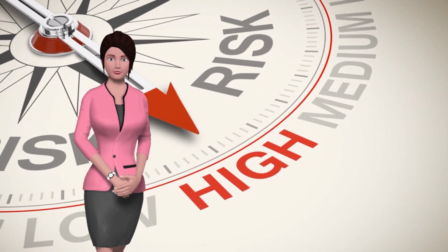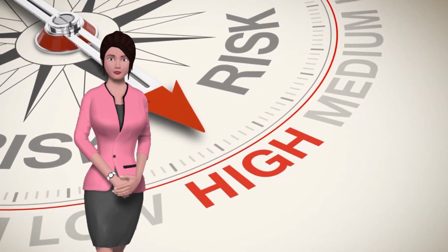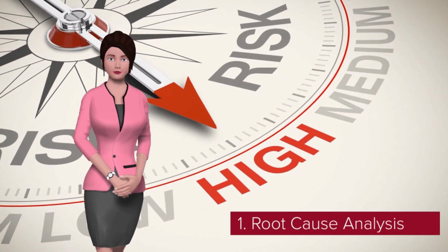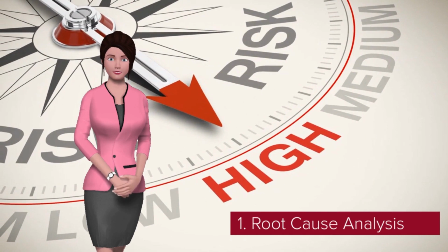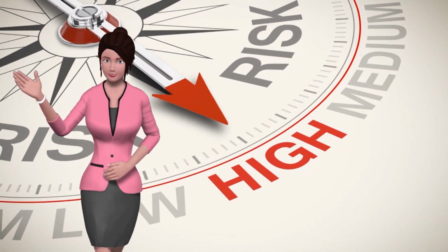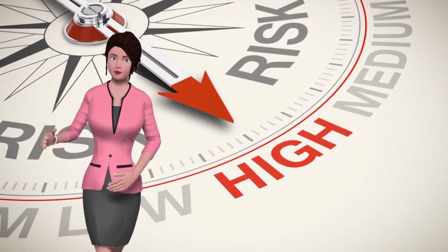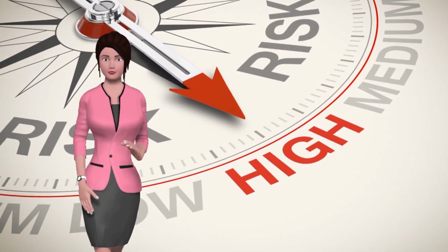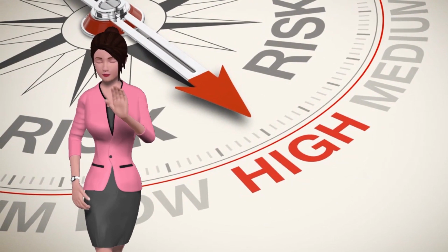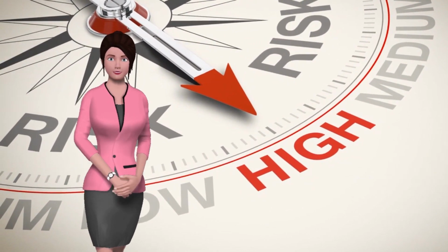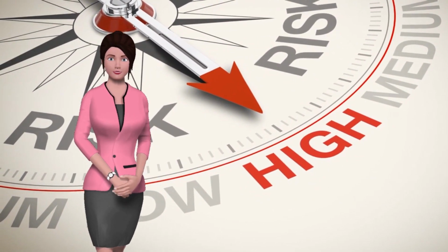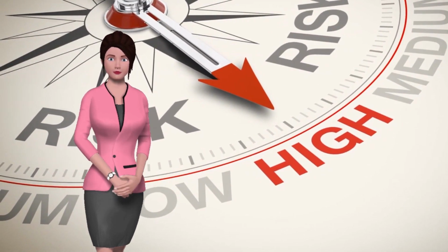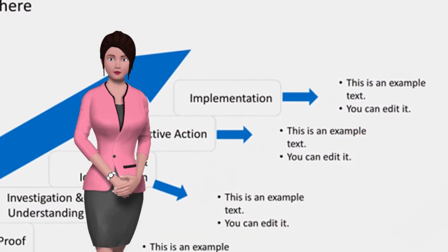The following are some of the risk management tools which can be used during a project. 1. Root cause analysis. The root cause is another way to say the essence of something. Therefore, root cause analysis is a systematic process used to identify the fundamental risks that are embedded in the project. This is a tool that says good management is not only responsive but preventative. Often root cause analysis is used after a problem has already come up. It seeks to address causes rather than symptoms.